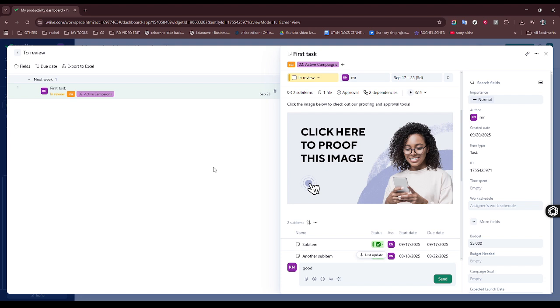Finally, let's talk about linking dependencies to visualize a waterfall flow. In project management, dependencies are the relationships between tasks. Some tasks can't start until others are finished. By linking these dependencies in your Gantt chart, you create a waterfall flow where one task's completion leads to the next task's start. To set up dependencies, identify which tasks are interrelated and need to proceed in sequence.